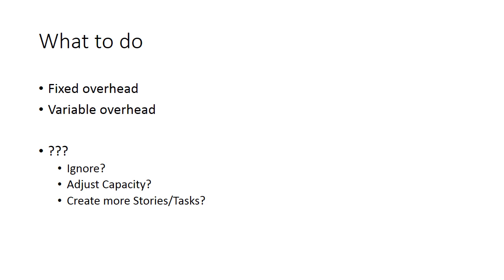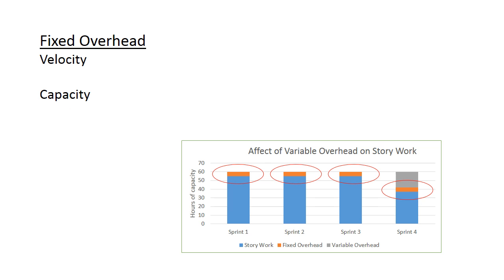The variable overhead decreases your capacity for work for one sprint, whereas the fixed overhead in orange allows for consistent team performance. The important question is: how do we handle fixed overhead and variable overhead? The fixed overhead items, such as backlog grooming, sprint planning, demos, and retrospectives, have a consistent effect on your capacity, and therefore they have no effect on your velocity. So I recommend you ignore these items with respect to velocity.